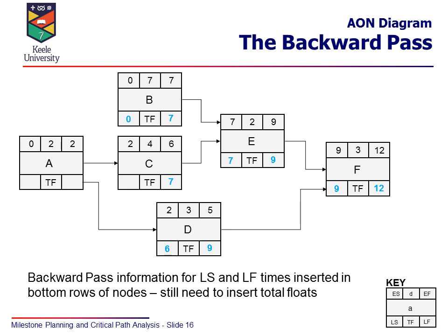Activity C, again, carry that latest start time of E back to become the latest finish. It's 7, takes 4 days, so the latest activity C can start is day 3. And then with activity A, again we have a choice here. We can take either the 6 or the 3, but we know that the latest that A can finish is 3, because otherwise C will be delayed. The latest start for C is 3. So on the backward pass we always take the lower figure where there's a choice. So we take the lower of 3 or 6, and that becomes 3 minus 2 is 1.